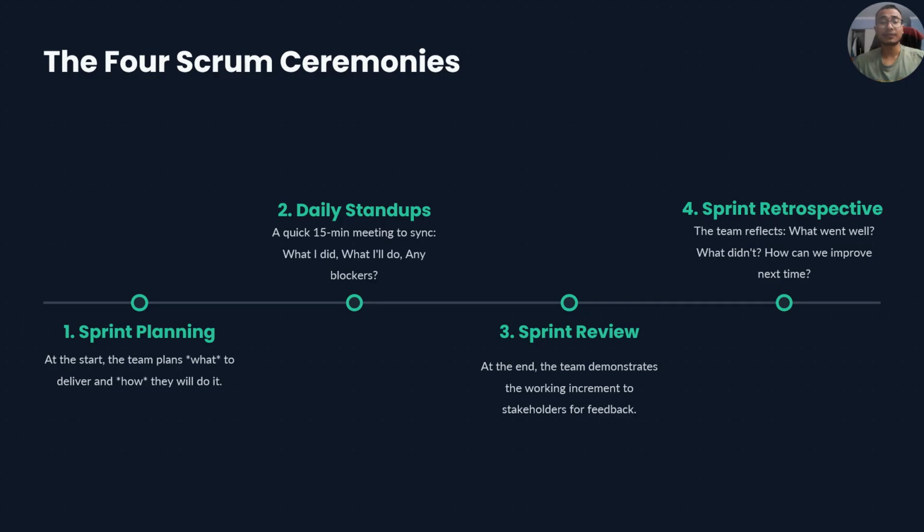And the next one is daily stand-ups. These are quick 15-minute meetings, so they are mostly 15 minutes in duration, and sometimes they can last a little bit longer also. Each team member shares what they did yesterday, what they will do today, and if they are facing any blockers, things like those.